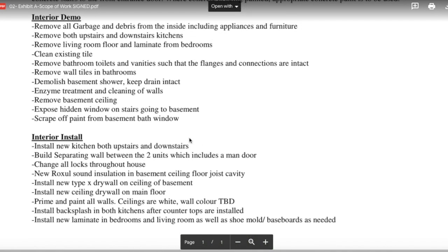And just remember, you want to include your taxes as well. It's something that you can't forget to include, because it is an expense on the job, right? Just because you can write it off doesn't mean that you're not going to incur that cost. So whenever you get your price and you're going to be putting it into your budget down the line, make sure that it's including your tax, because that is effectively what you owe that contractor.